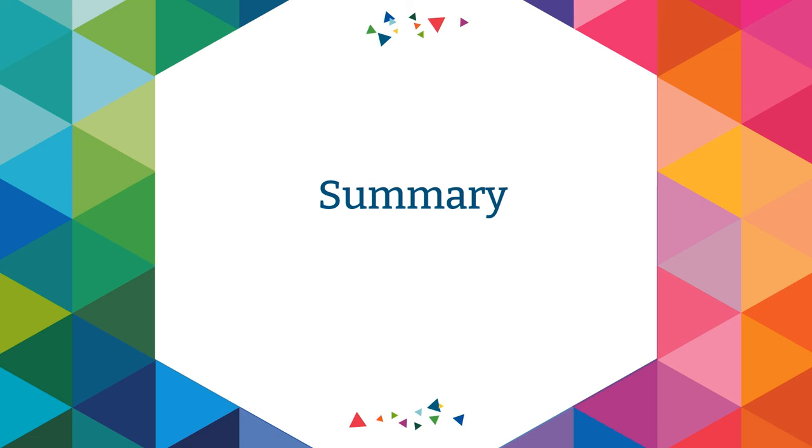RFI, sure. No more than 8 pages of response, so nobody is overworked. But you do that first, and you get a feel from that, which gives you the top 4 or 5, and then you can go have a 4-hour conversation with them. You just need a more detailed RFI, so you don't have to do 30 pages. Yeah, that's a great approach. I was going to suggest that as well.